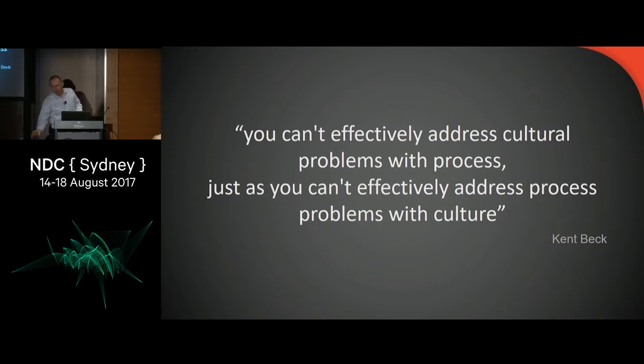The team also had to learn new skills. So they had to learn how to create work packets that could be merged in a day that made sense. You don't want half-tested code committed every day. You need to work on a logical piece that made sense, that could be committed, so that when you're merging with everyone else, it made logical sense.